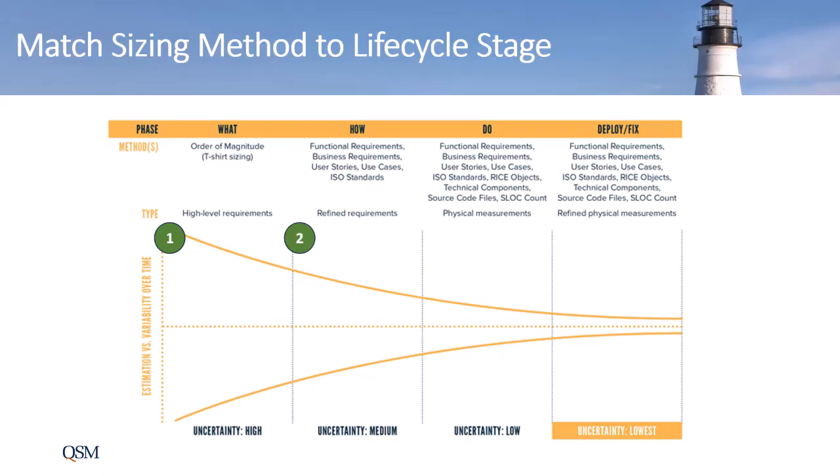During requirements and high-level design, single components such as requirements, features, user stories, or technical requirements are available. During construction and test, discrete testable parts of the system emerge. There are multiple components, perhaps like the RICEF objects often used to estimate commercial off-the-shelf packages, and technical measures like modules or source lines of code.